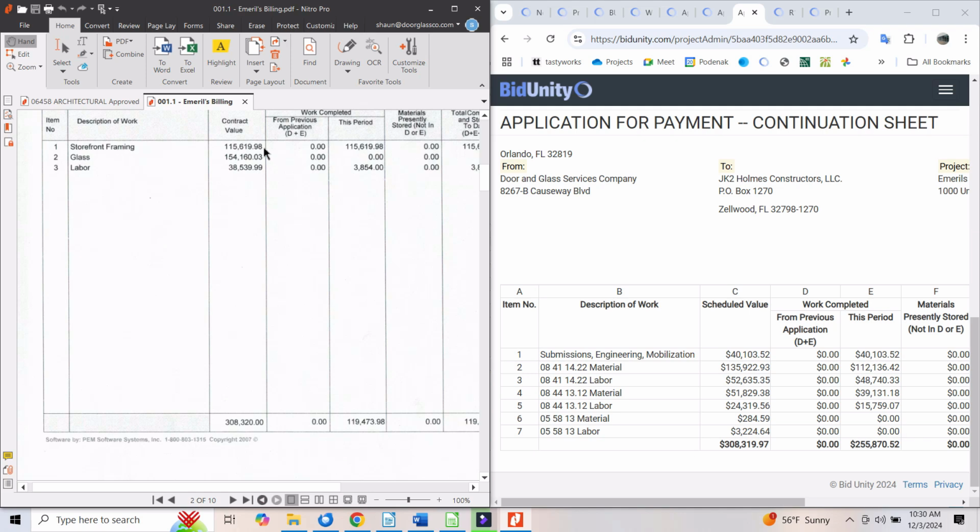Well, fast forward 2 months, we're done with the job, they're done with the job, and they send me a deductive change order, not for $35,000, but for $102,000. So how did they get to $102,000? They just made it up, and they said that's what it costs. And our paperwork sort of somewhat supported that, and so ultimately, for the work that was actually performed, it made our ability to recover that much harder.